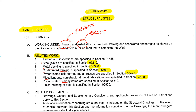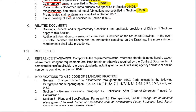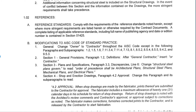We talk about the related documents in this particular spec section, and then we have references. The interesting thing to note here is this is where we're going to find modifications to the code of standard practice. The code of standard practice is the industry standard for production, fabrication, and erecting steel. And in this particular job, there's a number of things where that language is modified.